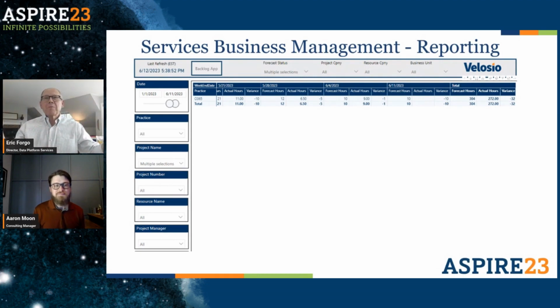So I'm looking up there right now and I'm seeing forecasts of 304 hours, actual hours of 272. We were a little bit under our forecast. Maybe we over delivered on this project, got done a little bit faster. But the key is it's around control and visibility again. And it's the integration of this Power BI report back to that same data set that we have populated with our apps. That's right.